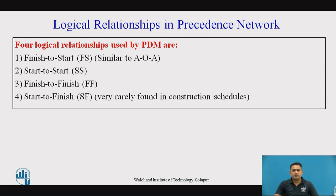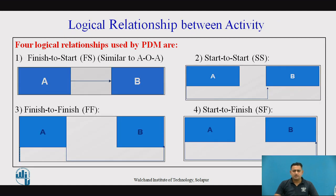Please go through that particular video for thorough information regarding all four relationships: Finish to Start, Start to Start, Finish to Finish, and Start to Finish. One important point — Finish to Start is mostly used in network diagrams, and Start to Finish is seen very rarely in overall projects. This slide presents the overall relationships between activities, showing successor and predecessor activities for each of the four relationship types.